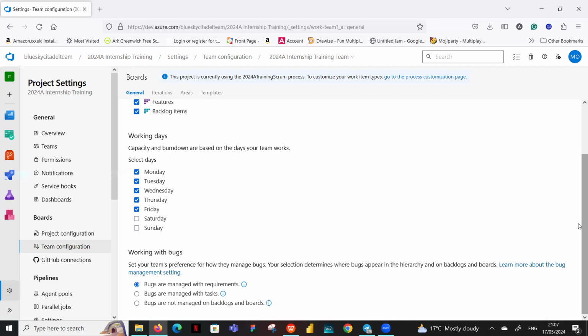Against 101, you'll be able to add the bug, create that bug, so that bug you created is linked to that story. And what you're saying is, I can't pass this user story because there is a fault or a defect in what has been done, and that bug is created against that story.